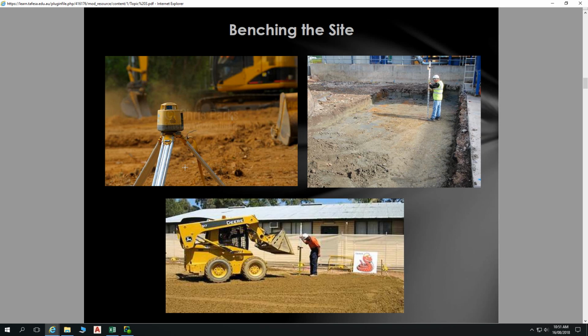You don't have to. It's a good idea to get power to the site in the beginning, particularly in rural areas where you won't have access to power for certain things, but you don't have to, because you do have a lot of battery gear, and also air compressors and air run gear as well for things. So I'd say with our site we won't. So we won't get that temporary meter box set up there.